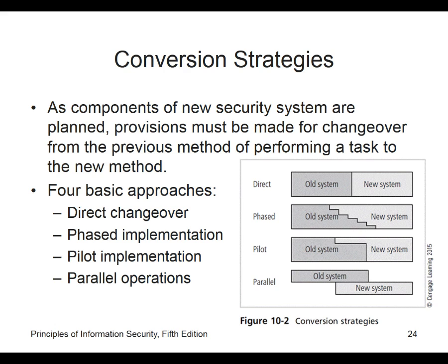And then parallel operations. We're going to keep the old, just start running the new, and then switch over. I worked for another company, Sergeant Grit Marine Specialties, that sold bumper stickers, T-shirts, even caskets for Marines. We were switching to a program called MOM, Mail Order Manager. It's about a $30,000 program, so it's a decent investment. When they were writing up the proposal, I said, what about the data from our old system into the new? Oh, no problem, we'll convert it for you. And I knew better. I said, can you send me that in writing? So they did. Conversion data included free of charge.